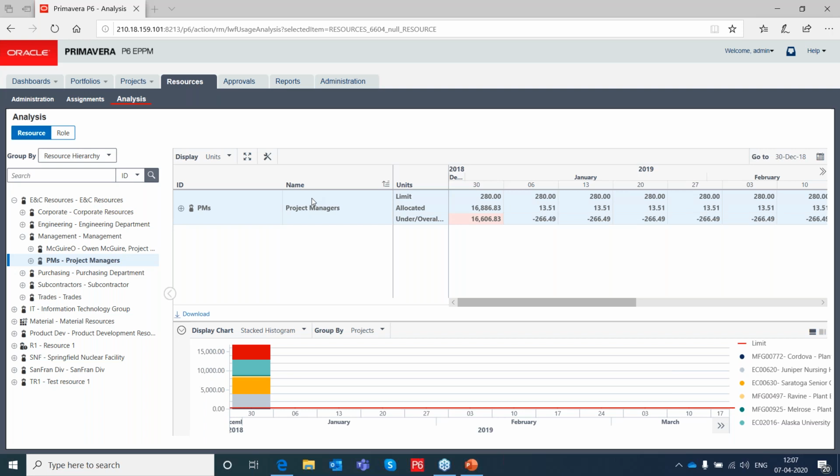I am a little bit unclear on this because resource leveling, imagine you do that, you are actually stretching the duration, which at times is not allowed. For example, you have a 200-inch total pipe and you need so many man days for the welders. You can't stretch the duration. You would rather the system should tell you how many more welders you should bring in. I mean, that is a practical way, unless you are working in US or Europe where it is driven by resources.